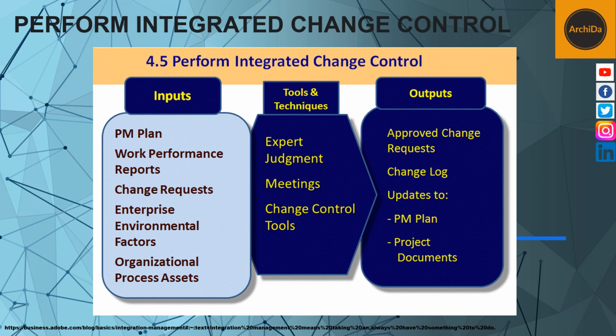Request and document any changes through an official process and avoid ad hoc changes to minimize scope creep. The project manager appoints members of a control board who help evaluate change requests and outline the next steps.